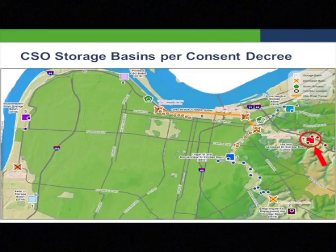So is that under Waterfront Park? Yes, part of it is. 200 feet below. You never know it's there. It's below the aquifer. It's in solid rock. I mean, we've done rock testing. There's no fissures in that rock. It's very solid rock. So if we found anything else, it wouldn't be feasible. So we've done that. We don't want to foolishly spend money there.